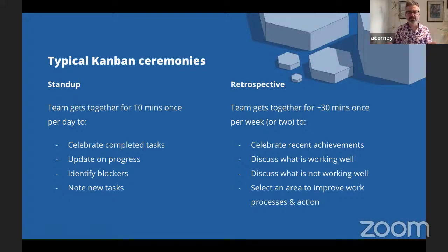So the first thing that should happen in a stand-up is you say, what did we finish yesterday? Stand-ups are usually first thing in the morning, they don't have to be. And then everyone says, well, this is finished, and then it's a celebration. Yay, well done, that's really great. Congratulations on finishing that task. Okay, so there is a sense of completion and celebration of that. It's also an update on progress so that everyone can hear a one-sentence update on what people are doing and working on and how they're going with that.